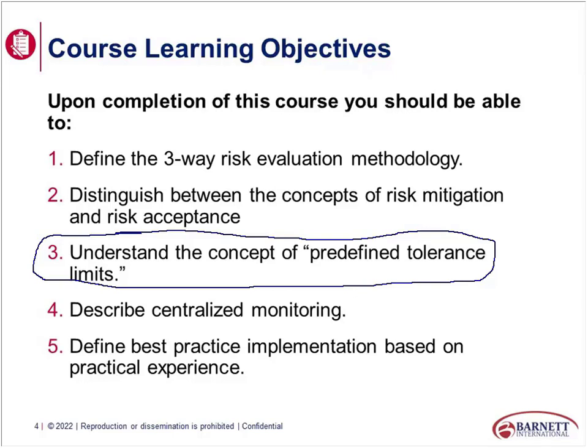We still have to be flexible because things change and things happen we didn't expect. But basically, the concept is a tolerance limit is the thing that cannot go wrong — that this will impact our results, this could impact safety. By predefining it, this is our red zone. We cannot get to our red zone. So what are our warning signs before we approach this is really what it's all about.